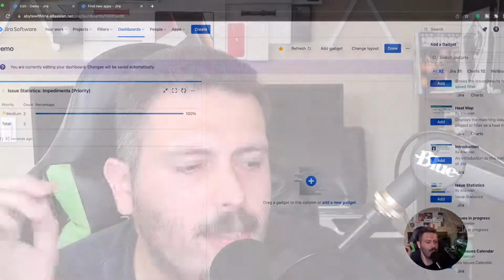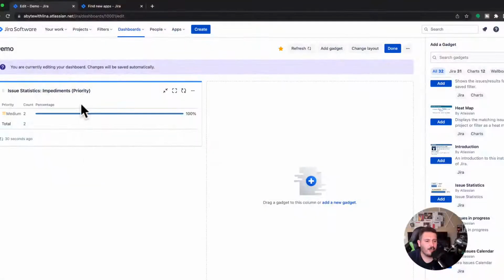So that now when I meet with my executive team, the decision makers, the people that can actually do something, we can say, okay, I have 50 blockers, and here are the top priority ones. If we don't fix these 5 blockers that are priority 1, bad things will happen. So you can really leverage your priorities and use these metrics to help you paint the picture, so that you can then appropriately adjudicate it.